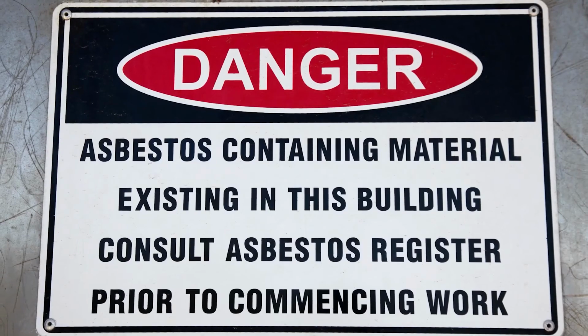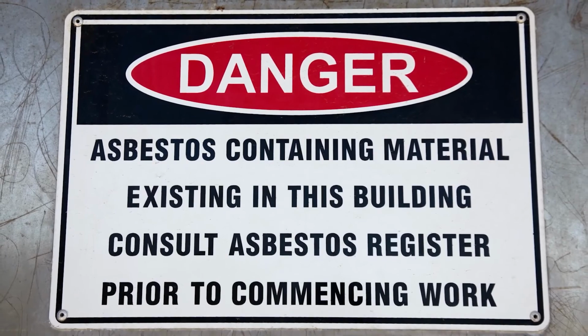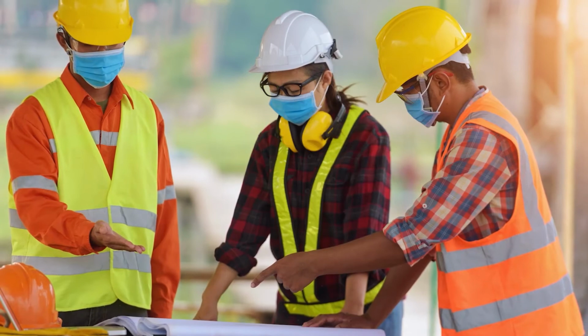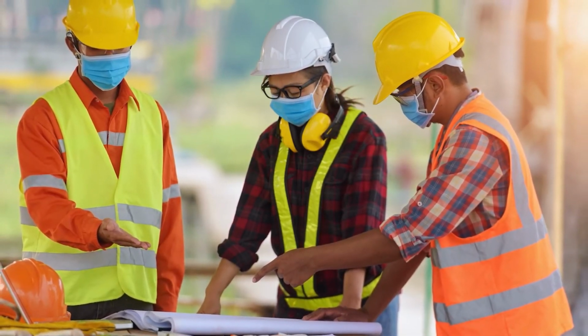Mechanical rooms where asbestos is presumed to be present will have signage at the entrance to the room. In the event of damage or disturbance to asbestos-containing or presumed asbestos-containing material, contractors must stop the work immediately, report the issue to the project manager, and isolate the area to keep personnel out until corrective actions are complete. For a review of potential asbestos locations within Mount Sinai, contractors are asked to review information with the project manager or environmental health and safety.